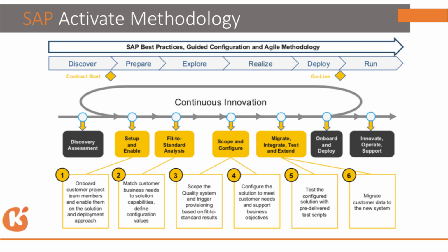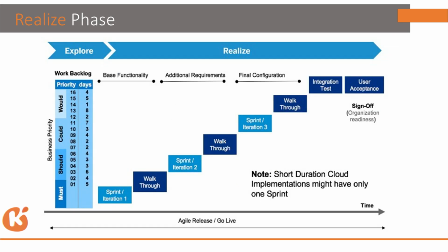Without sign-off, you should not start the configuration, because the reason is, you got the requirement, you start the configuration, and again the client will say this is not my requirement, something different. So again, you have to rework. In order to avoid the rework, we need to go into realization with the signed-off workbook, so that everything is updated in the workbook and you also have the sign-off from the client. It will be good for you also, so that the rework can be avoided.